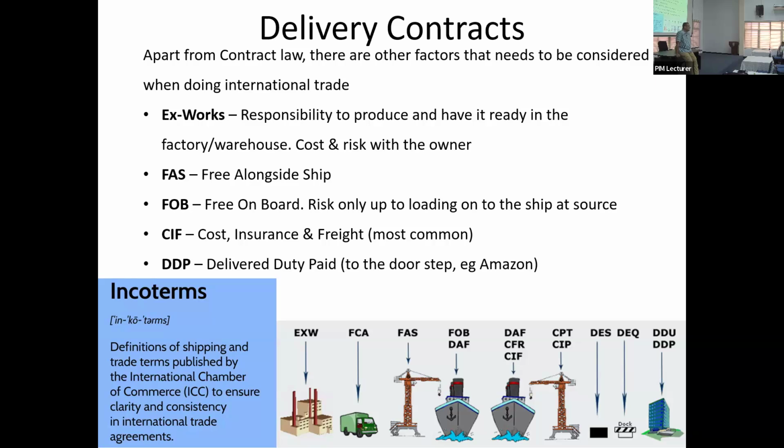So when it landed here, I incurred a huge cost. In my project pricing, I got it wrong. So it's important to use the right terminology in your contracts, especially with overseas manufacturers if you are doing a project. Okay.